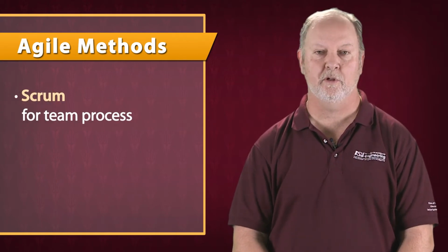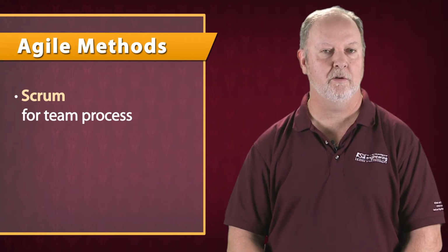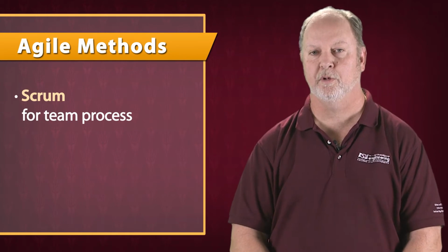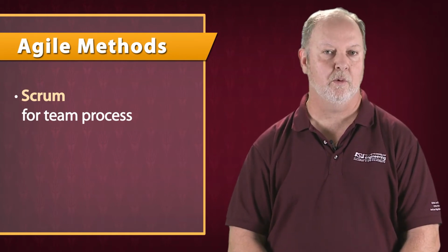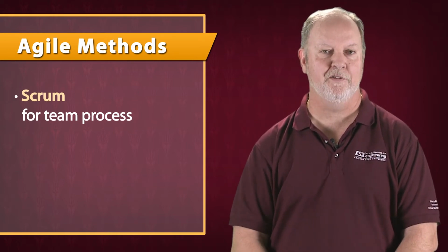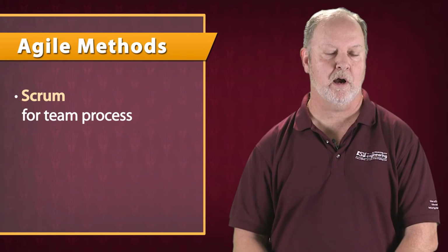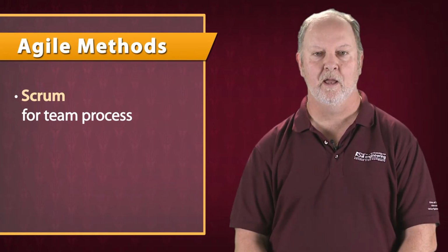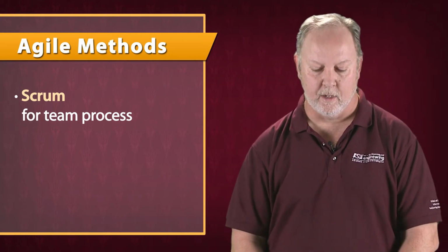The foundation for this course is Agile methods. And I say Agile in the broad; there are some Agile specific processes, and two of them are particularly relevant for this course. The first one is Scrum. You'll work in a team-based project using the Scrum methodology, meaning you will work in iterations, or what's called sprints. You will work through a product backlog and a sprint backlog, and you'll learn how to construct the backlog, fill it up with user stories, how to track your progress through burn down charts, how to work in continuous integration and testing, how to measure your progress, and so forth.